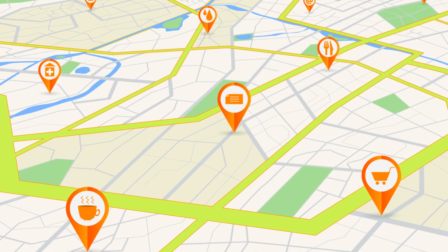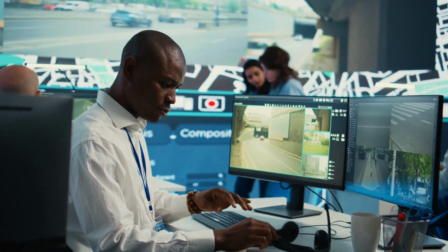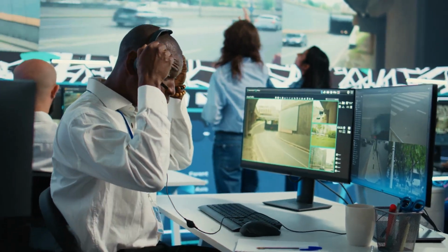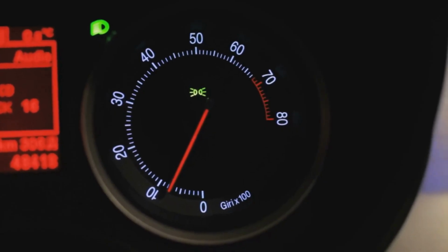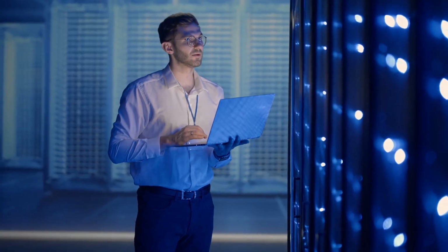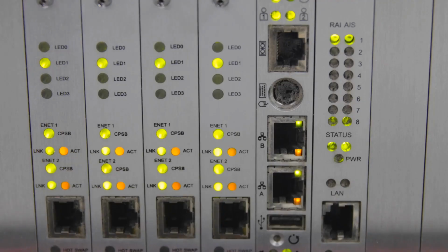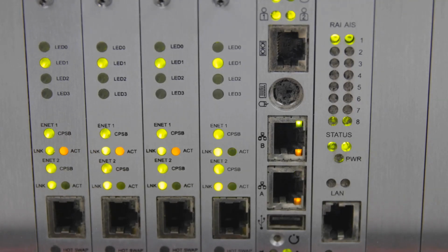The role of AI does not end once the plans are finalized. It continues to provide significant value during construction and through the network's operational life. During the build, AI acts as a sophisticated project management tool, dynamic scheduling of construction crews, delivery of materials, management of permits. By creating an optimized workflow, AI can reduce idle time for expensive machinery and for specialized labor. If an unexpected delay occurs in one area, the AI can instantly recalculate the master schedule and redeploy crews to another part of the project.